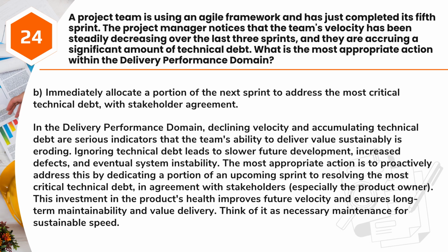The most appropriate action is to proactively address this by dedicating a portion of an upcoming sprint to resolving the most critical technical debt, in agreement with stakeholders, especially the product owner. This investment in the product's health improves future velocity and ensures long-term maintainability and value delivery. Think of it as necessary maintenance for sustainable speed.